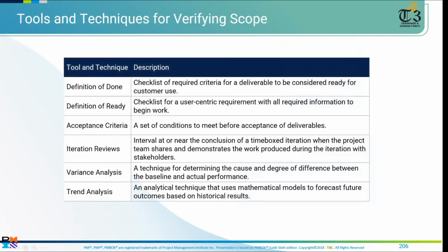So there are some small definitions, and these are important ones. There's nothing like you can escape it. Definition of done is related with acceptance criteria. It's like a checklist that you have done this feature, this feature, this feature. So when definition of done is finished, it means you meet the acceptance criteria. You can say definition of done is like a checklist, and acceptance criteria are all the required options in the checklist. This is called definition of done.